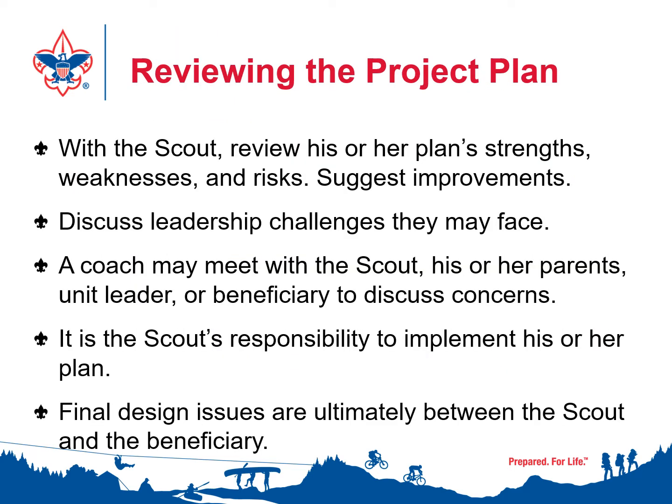So you've sent the scout on his way to work with his beneficiary and come up with their project plan. Tell the scout to come back when he feels that he has his project plan completed for you to look at it. When he comes back, review the plan with the scout, the strengths and the weaknesses of the plan. Have the scout think about risks. What risks are there with the plan that he has in place? Discuss any leadership challenges he may face. You might want to meet with the scout, his parents, or unit leader, or beneficiary if you have concerns. If you're seeing something and it's looking bad, you might want to have another meeting with somebody who's working closer to the scout on the project.